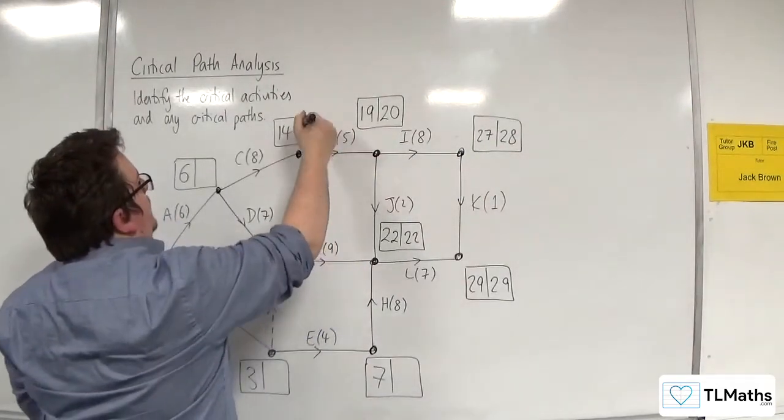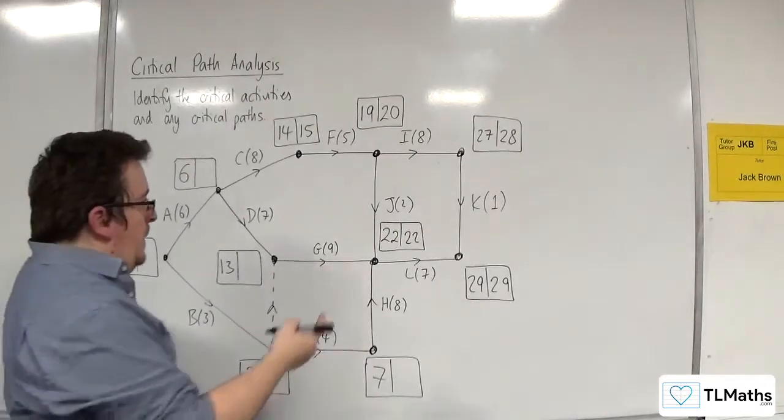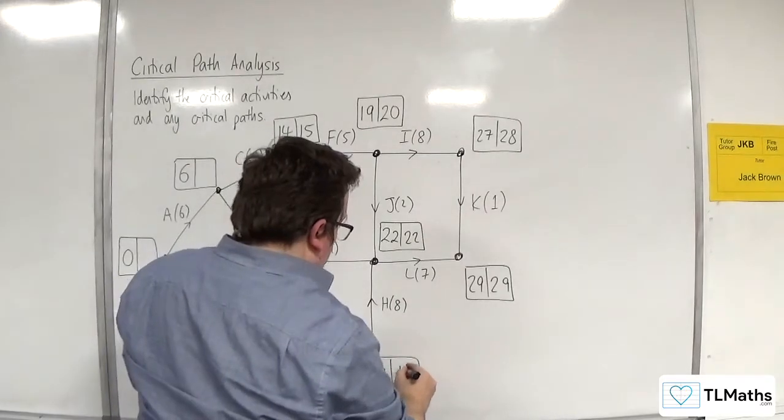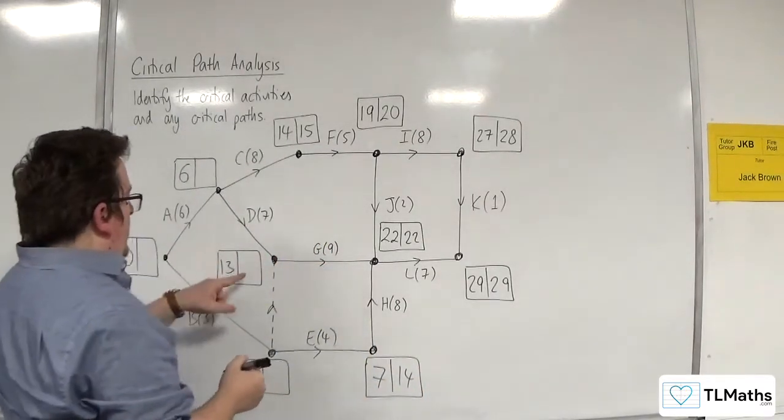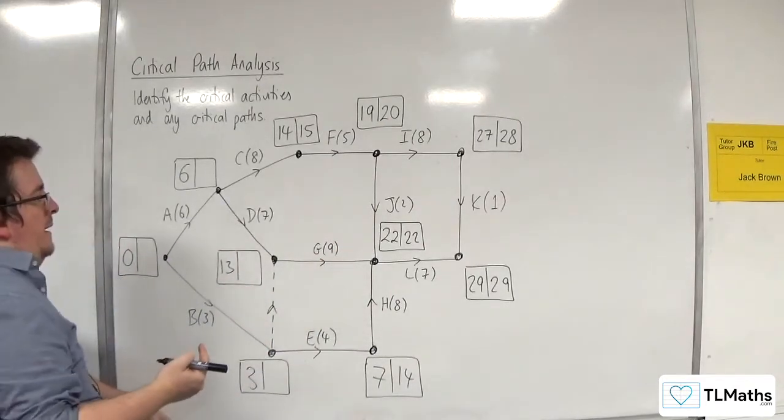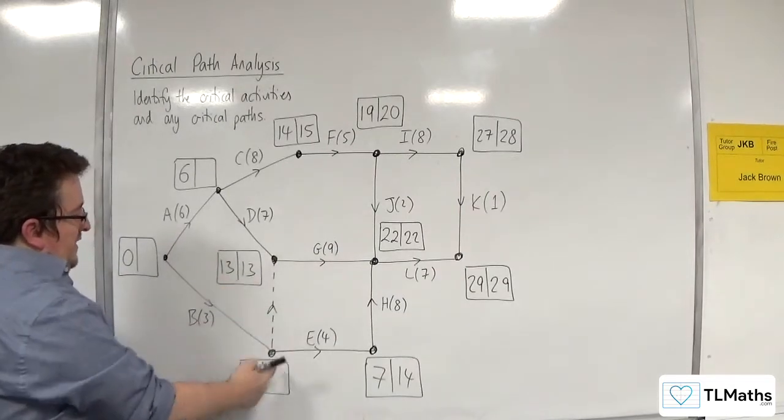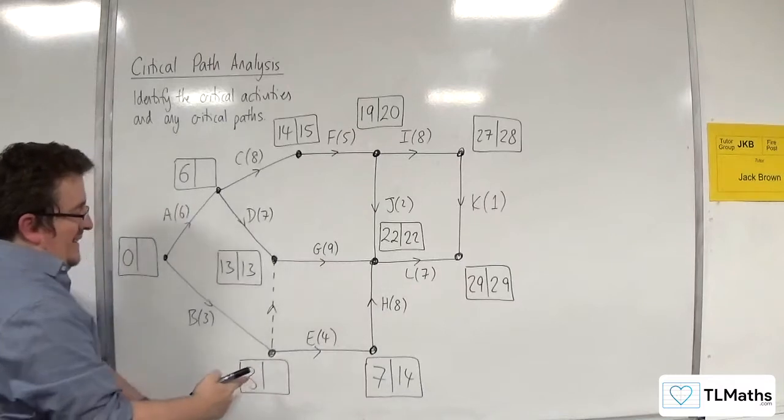20 take away 5 is 15. 22 take away 8 is 14. For this one, 22 take away 9 is 13. For here, we've got 13 take away 0, so 13, or 14 take away 4 is 10.